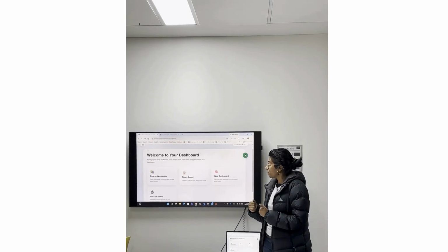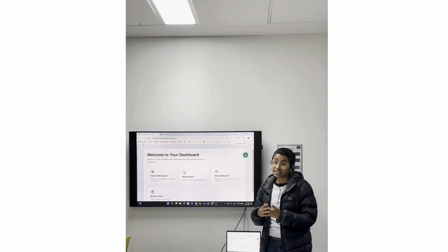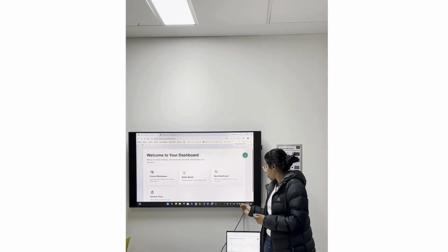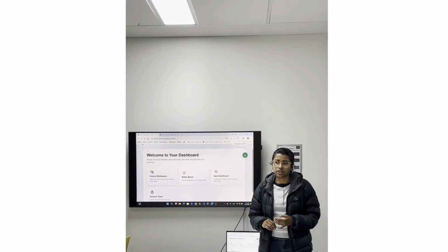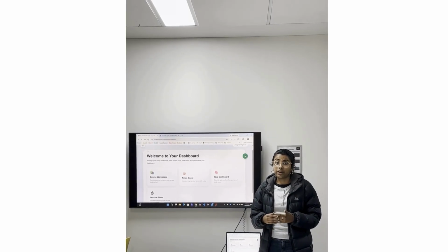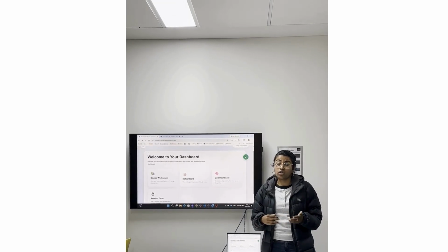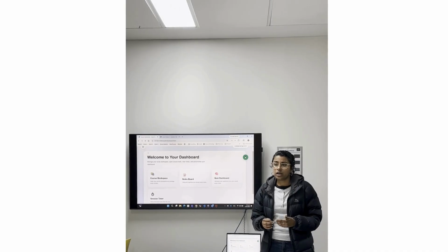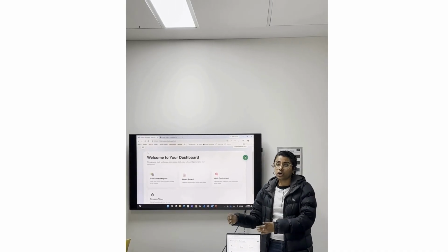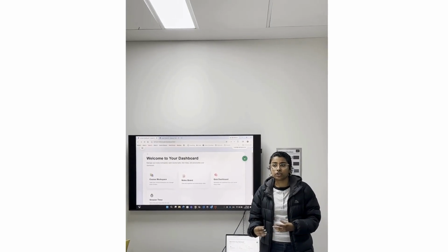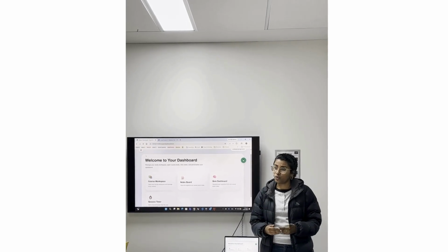We did the wrong estimation of a lot of the functionality, and we had to take a lot more time than needed, and therefore we were not able to complete everything on time, and it was a lot more rushed towards the end. We also did not estimate the skills that we would need. We thought we would be okay as we went on, but having to learn new languages or new products and be able to use them was really difficult for all of us, even though we did pull through at the end.